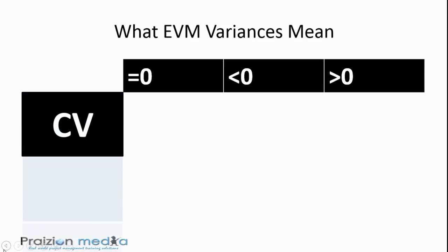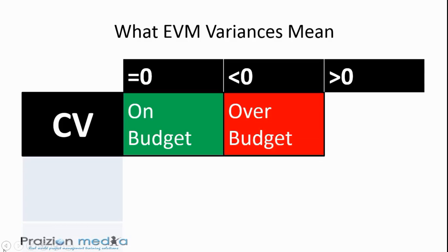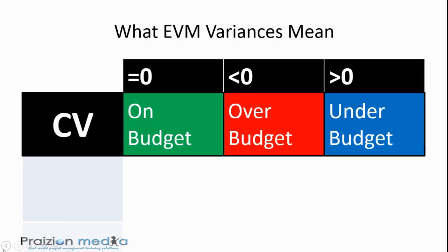If you are dealing with a cost variance that is equal to $0, that means you are right on budget. Now, if your cost variance is less than $0, it means it's negative, right? Negative is bad. That means you are over budget. If your cost variance is greater than $0, greater than $0 means positive, right? Positive. And that means you are under budget.